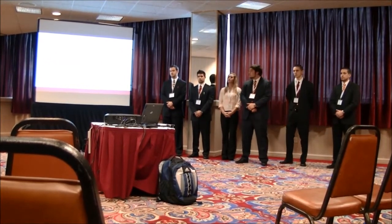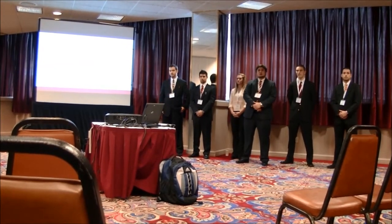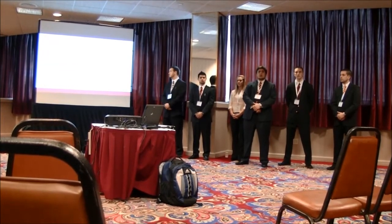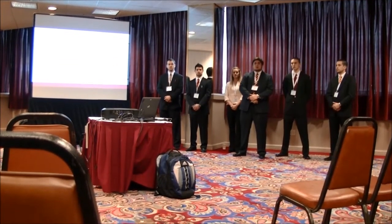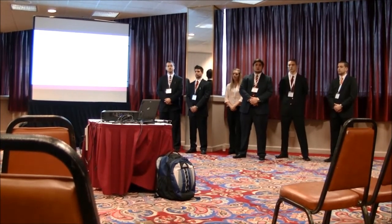Also in the afternoon session, we received the first estimating problem. We began by breaking this problem down into 3 sections: calculating the consumption factor, forming the quantity takeoff, and finally producing a cost estimate. We knew that calculating the consumption factor and the cost would be mainly number crunching, so we decided to focus most of our efforts on the quantity takeoff.